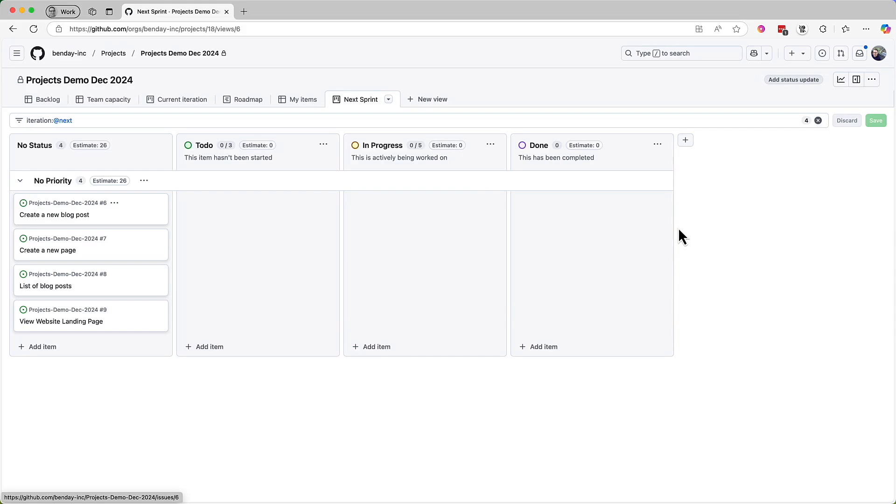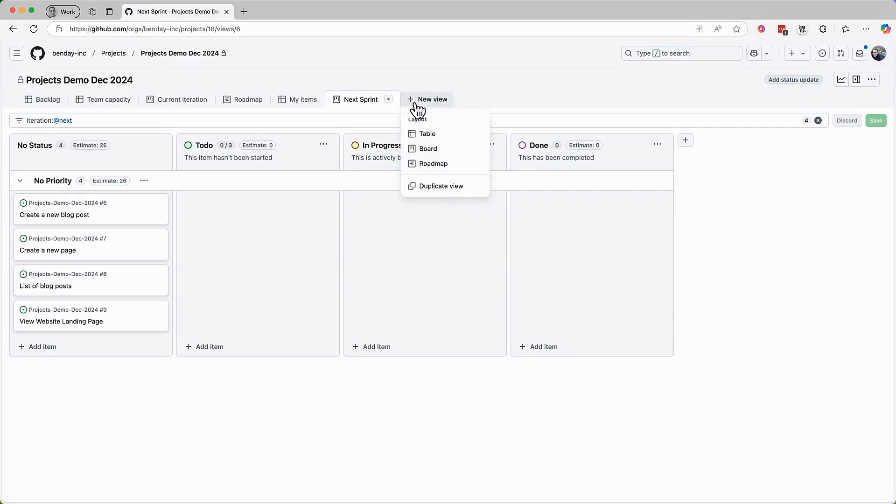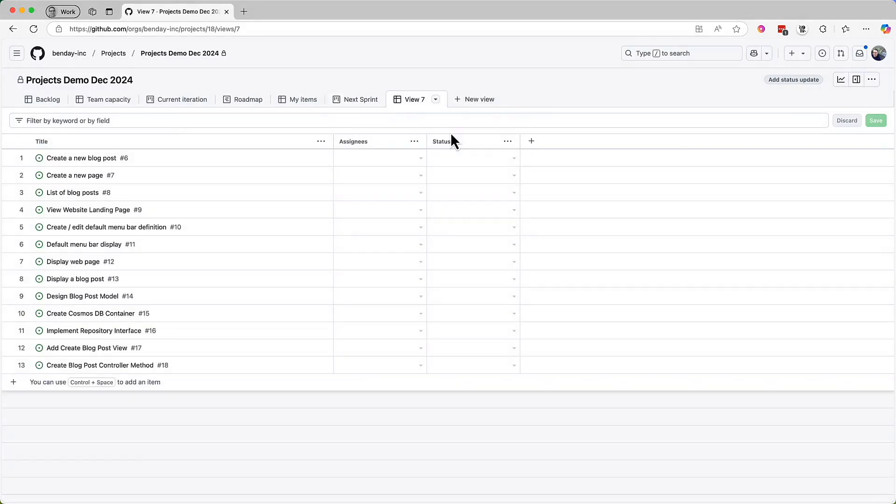The solution that I've come up with is to create a separate view. I'm going to create a new table view. And now through this view, all the sub-issues that we created are visible in the project. But this still isn't exactly ideal because this is a combination of all the issues in our entire project, regardless of what their issue type is. So it's kind of showing us too much stuff.